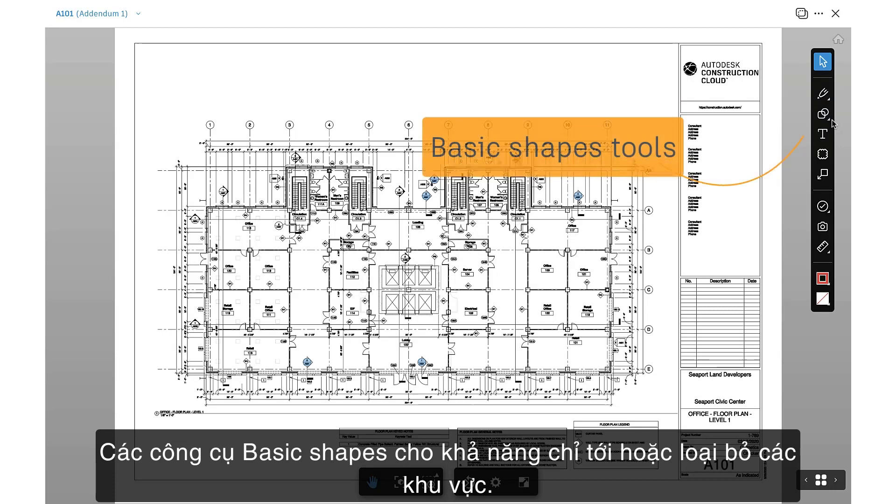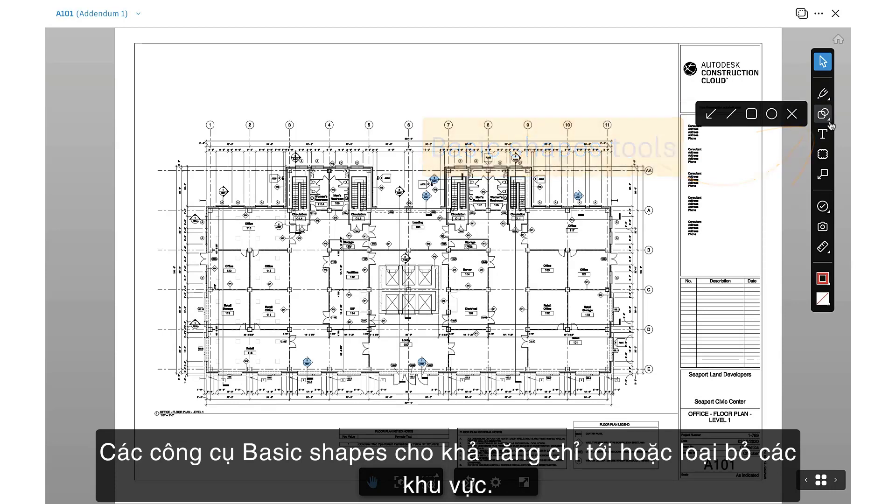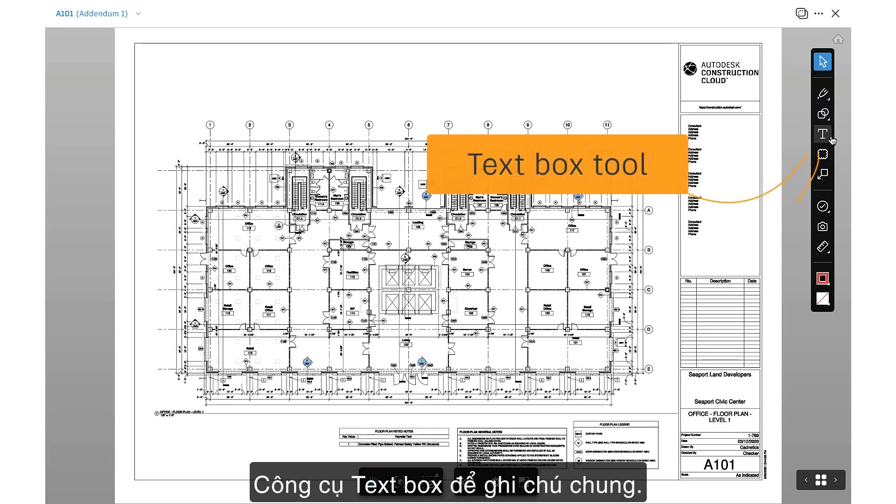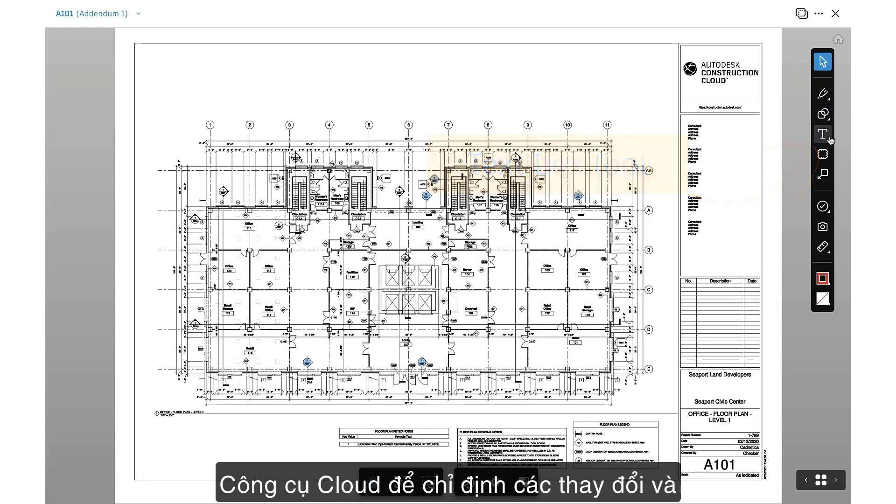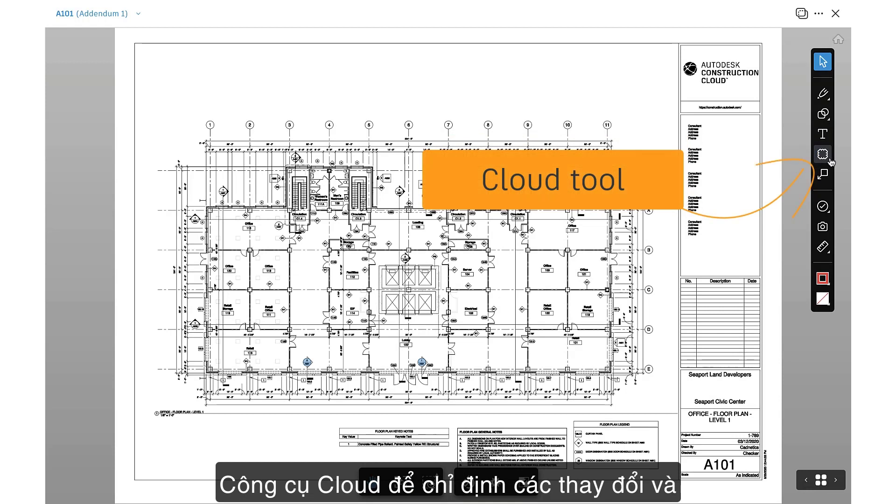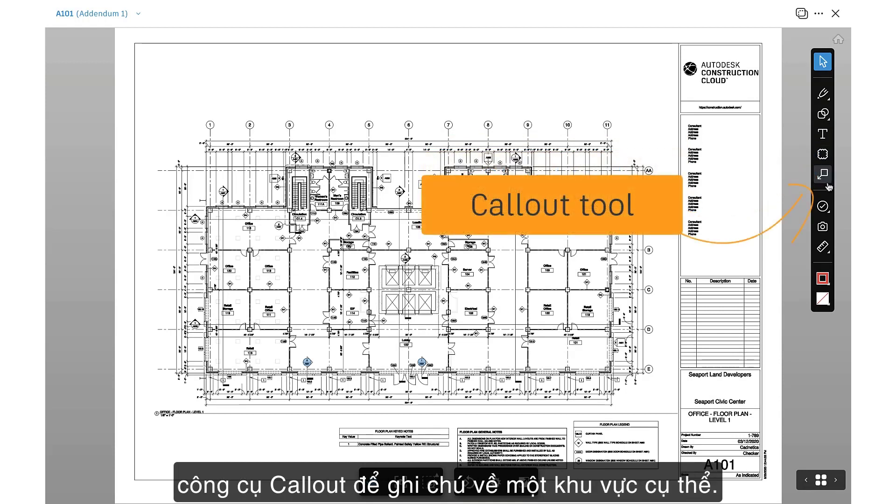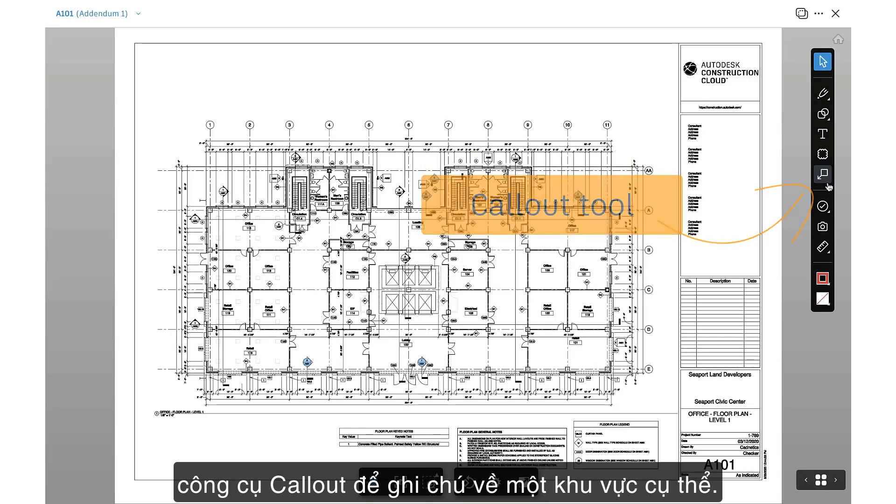Basic Shapes tools for the ability to point to or eliminate areas, Text Box tool for general notes, Cloud tool to designate changes, and the Callout tool to make notes about a specific area.